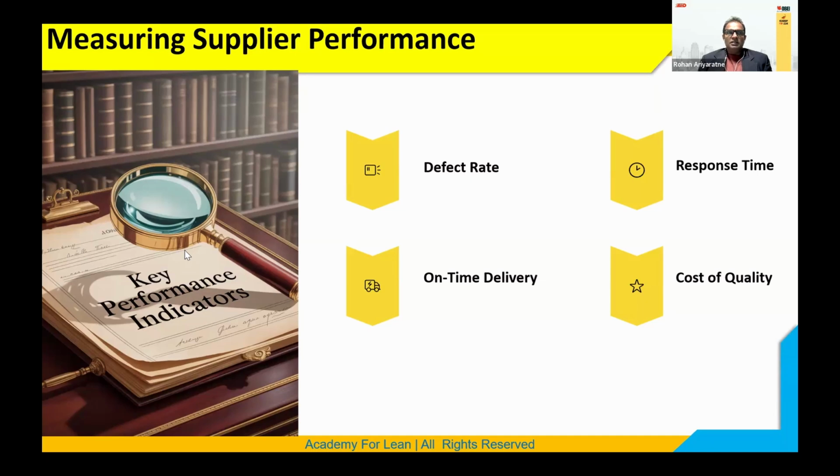when you are working with a supplier. This is one of the major challenges the sourcing department struggles with. They commit to giving the material on time, but their commitment is poor. Because of that, the manufacturing team is struggling. Why are they rushing? Because the customer never changes their delivery date, right?